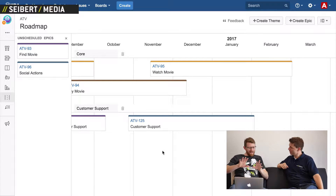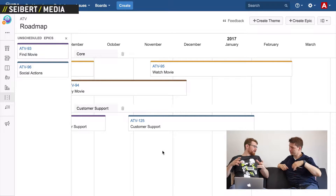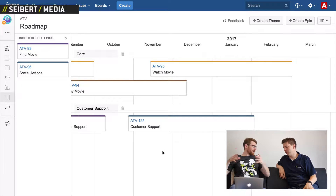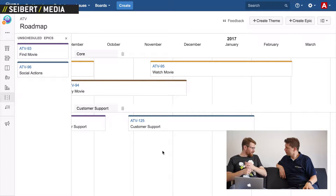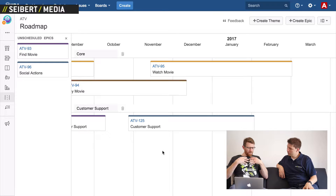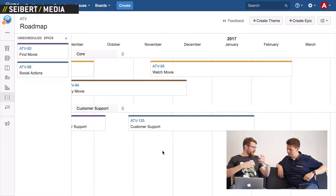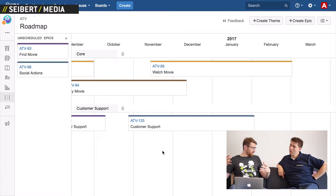When you talk about a Gantt chart, I think about a roadmap. On my roadmap, what are the big chunks of work I'm going to do? They're like boulders. I break my boulders down into rocks, which are my user stories, and I break my rocks down into pebbles, which are my acceptance criteria. There are these different levels of granularity. As a product manager, I want to know how I'm sequencing my big chunks of work over the coming three, six, maybe twelve months.